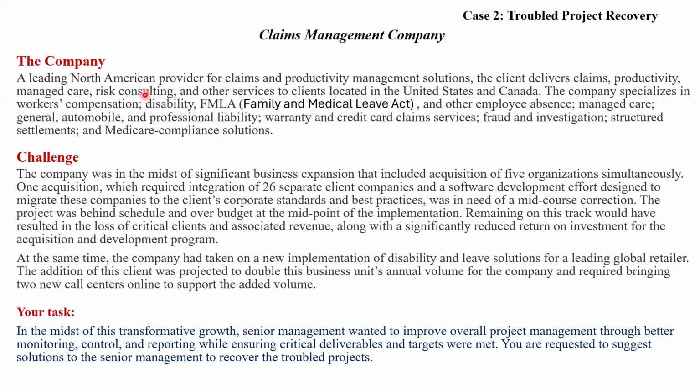So that's why the main issue that we can identify in this case is that the members of the project teams have not properly coordinated or communicated the responsibilities that they have been assigned. They have not properly developed and communicated the schedules and work breakdown structures and everything. And that's why most of the activities are over budget and delayed, right?